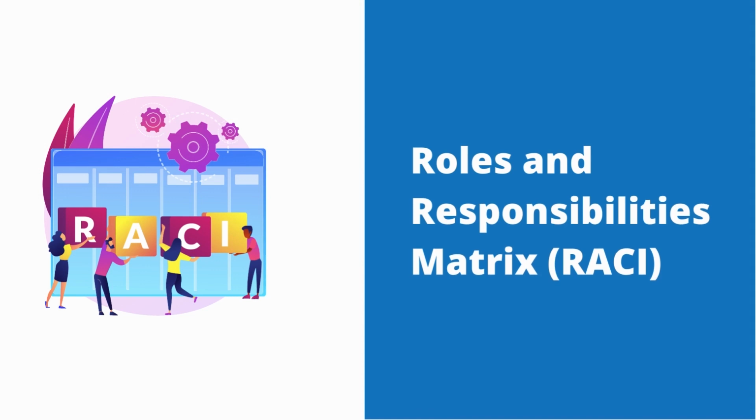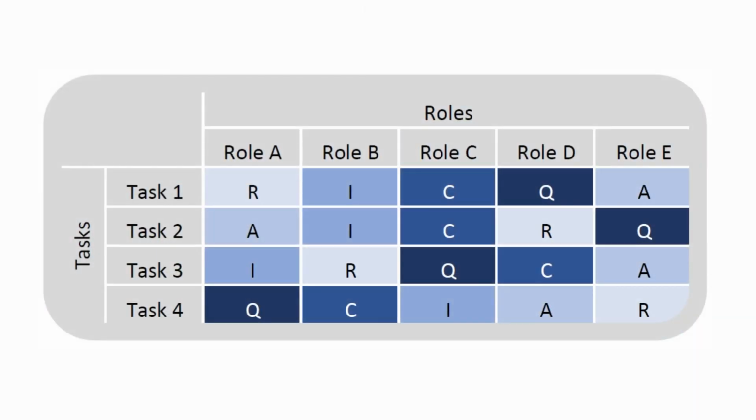A roles and responsibilities matrix is a chart that maps out all the key responsibilities for a project by role. Usually, the matrix will list key responsibilities down the left column and key individuals by name or by role across the top. Table has tasks on the left ordered in numbers 1 through 4, and across the top is roles listed with letters O through E in each field. There are different shades of blue and letters RACIQ in the cells that match the same color. Then there are 5 images of men and women of various ages that are all smiling.